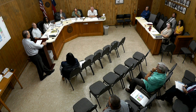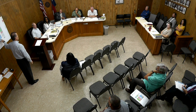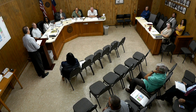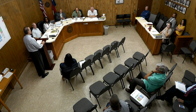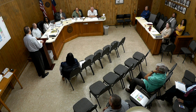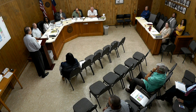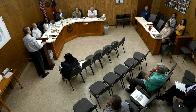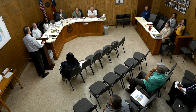So to get to that point, we're here in early September. If we approve this plan or some semblance thereof that's close to it, I'd recommend we go out to bid at the beginning of the year. That's a good bid time. To finish up the construction documents and make sure we get buy-in from everybody, that would be near the end of the year. It's not a real good time to bid through the holidays. So I think the beginning of the year would be when we get everyone's attention. The holidays are done, deer season's done. Contractors are eager to fill their first year with a new job.